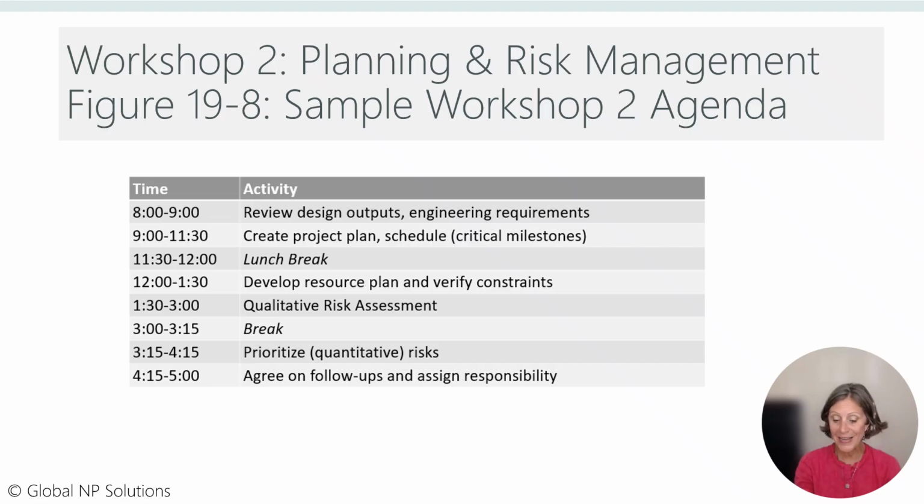If for some reason finance is not serving a role on the core team, this function must be represented to discuss investment risk. Finally, in today's world, supply chain often represents a significant risk for raw material delivery and distribution of finished products. If these concerns impact the new product development project, someone with expertise in supply chain, logistics, and/or distribution should be invited to the session. In some cases, vendors and suppliers are included in all or part of the planning and risk management workshop. Vendors and suppliers will be working with the new product development team to design components for the new product.